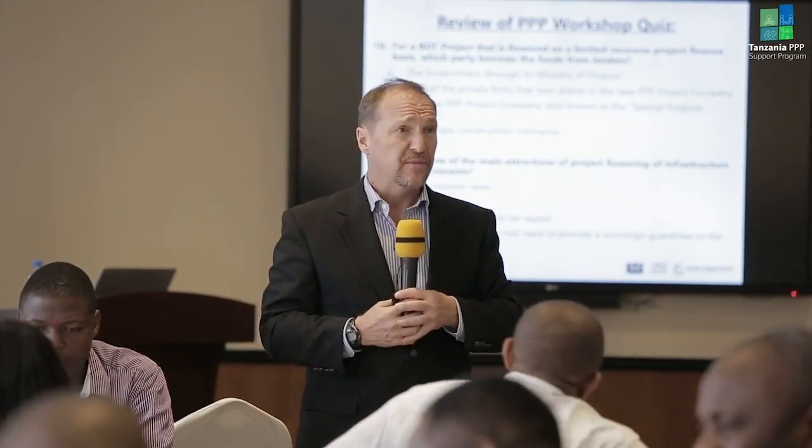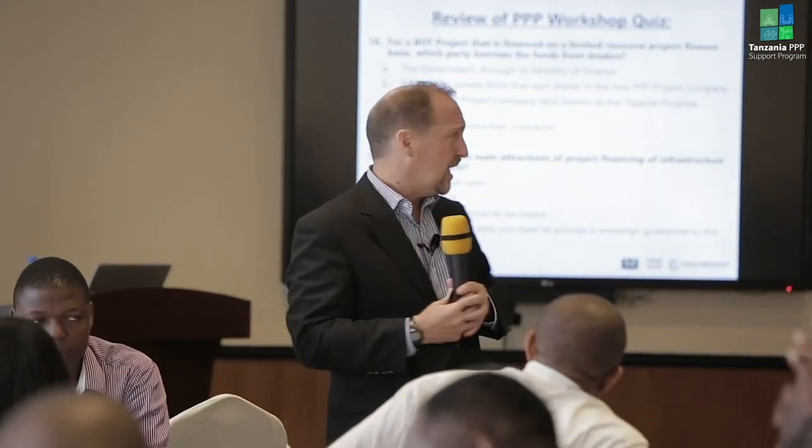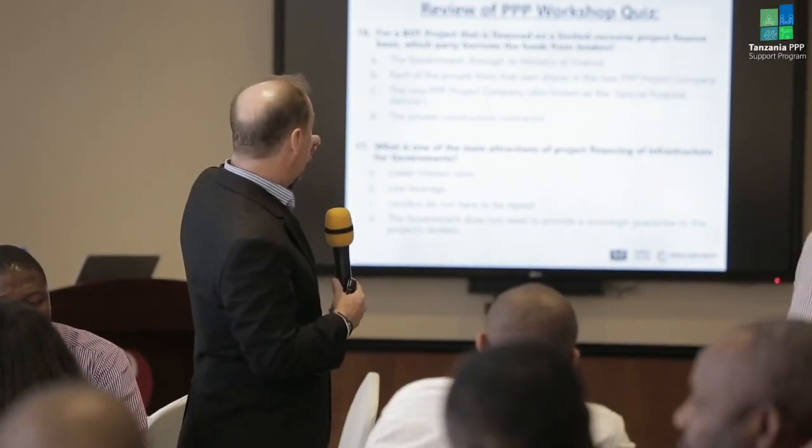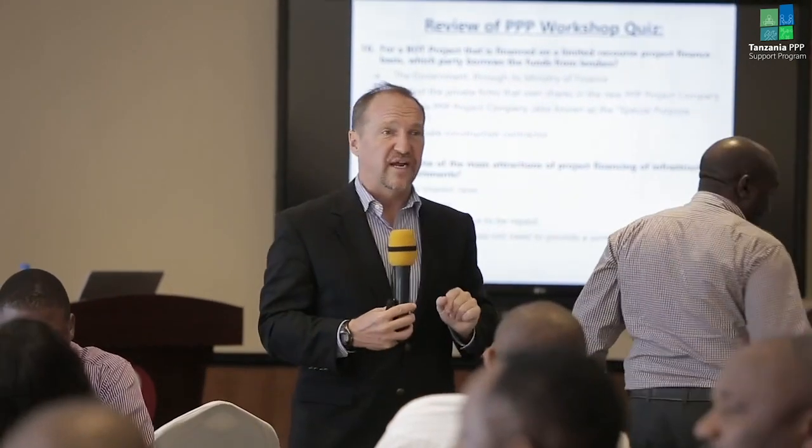Is it A? Is it that the government borrows the money? No, okay, you're correct. Is it B, each of the private firms that owns shares in this thing called the project company? Correct, it's not them. Is it C, the project company itself, also known as the SPV? Yes. That's what we mean when we say it is limited recourse project finance.